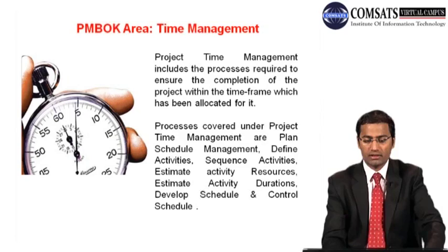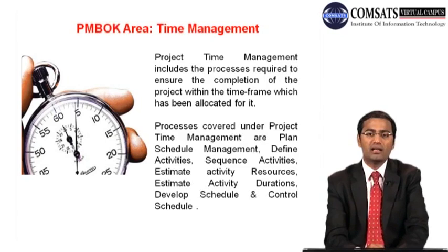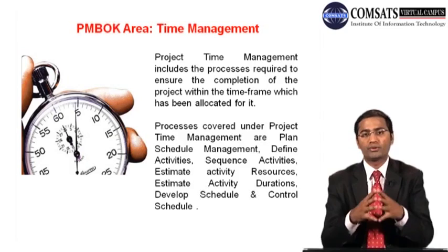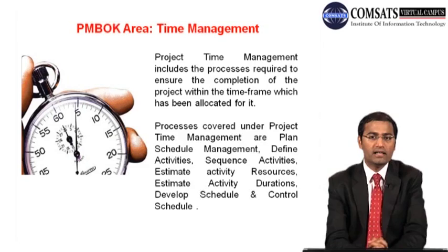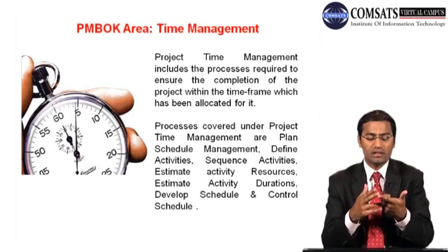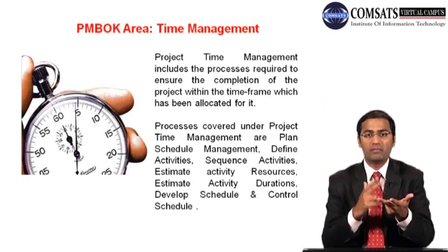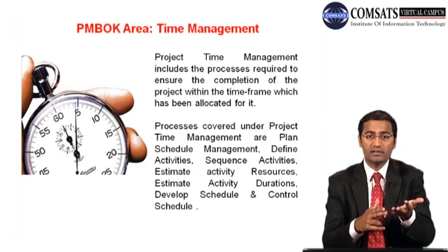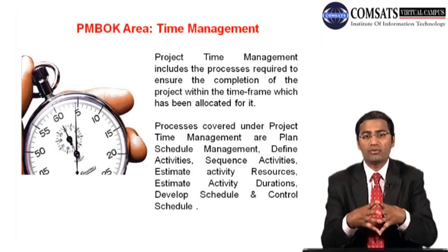After having this, we estimate the number of resources and the time for which these resources are needed. So the resource requirements for a particular activity are decided in this process. If we are constructing a house and there is an activity of erecting a wall, resources may be the bricks, the cement, the sand, the water, the mixer, then laborers, the shuttering, scaffolding, the masons, a supervisor, and then an engineer. I've just counted about 11 resources. So 11 resources are required.